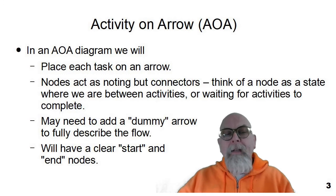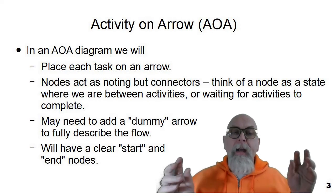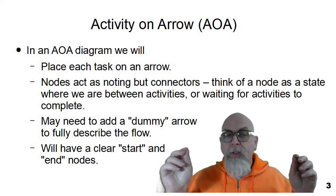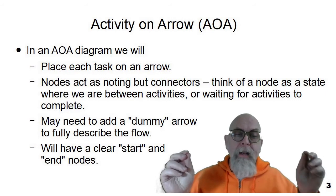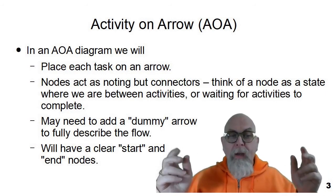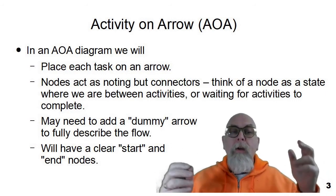You may need to add a dummy arrow or an activity with zero duration or with no job, but call it dummy, just to fully describe the flow. And in an AOA diagram, there will be a clear start node and a clear end node, and it should be marked so the arrows all go from a node to a node.